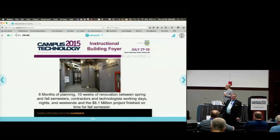And from November of 2013 till May of 2014 was our planning phase, and then all construction was done in 10 weeks. So, an $8.1 million renovation. We knocked out every wall on the north side of our building on the first and second floors and rebuilt it from scratch. So, like I say, very short time frame.